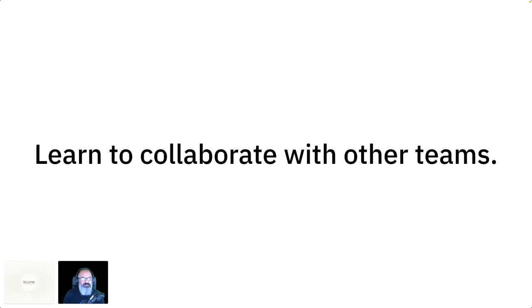One of the most successful things I ever saw an AsgharLabs subsidiary do, which took a lot of buy-in from executive management, not going to lie, this is something you just can't implement because it's a massive change. With every sprint, they switched out one person from their tribe to another tribe for that global application. So imagine that. Every single 2 weeks, you have a brand new person inside your cohort where you need to train them. They need to understand what's going on, and they need to be able to commit some code before they're gone in 2 weeks.